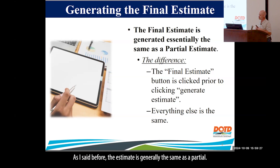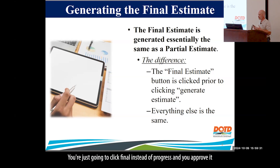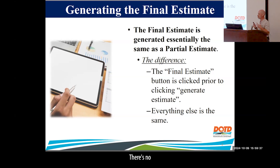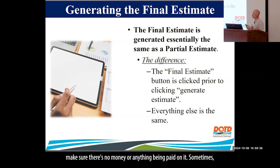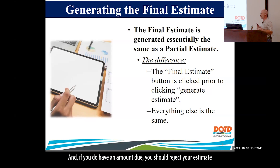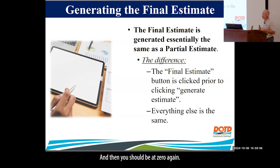The estimate is generated the same as a partial — you're just going to click final instead of progress, approve it, and everything else is the same. Always before you approve it, make sure there's no money being paid on it. Sometimes it can show an amount due. If you do have an amount due, reject or delete your estimate and regenerate another partial estimate, and then it should be zero again once you do another final estimate.